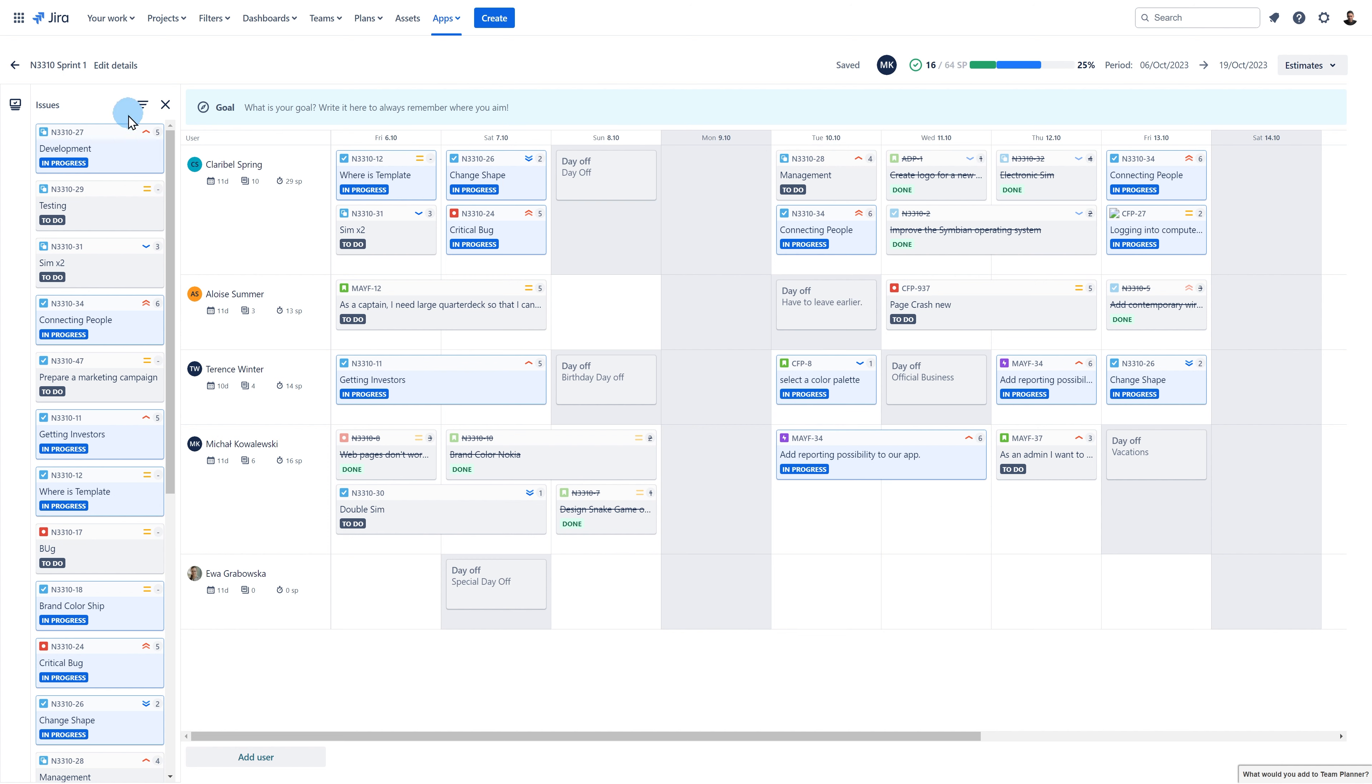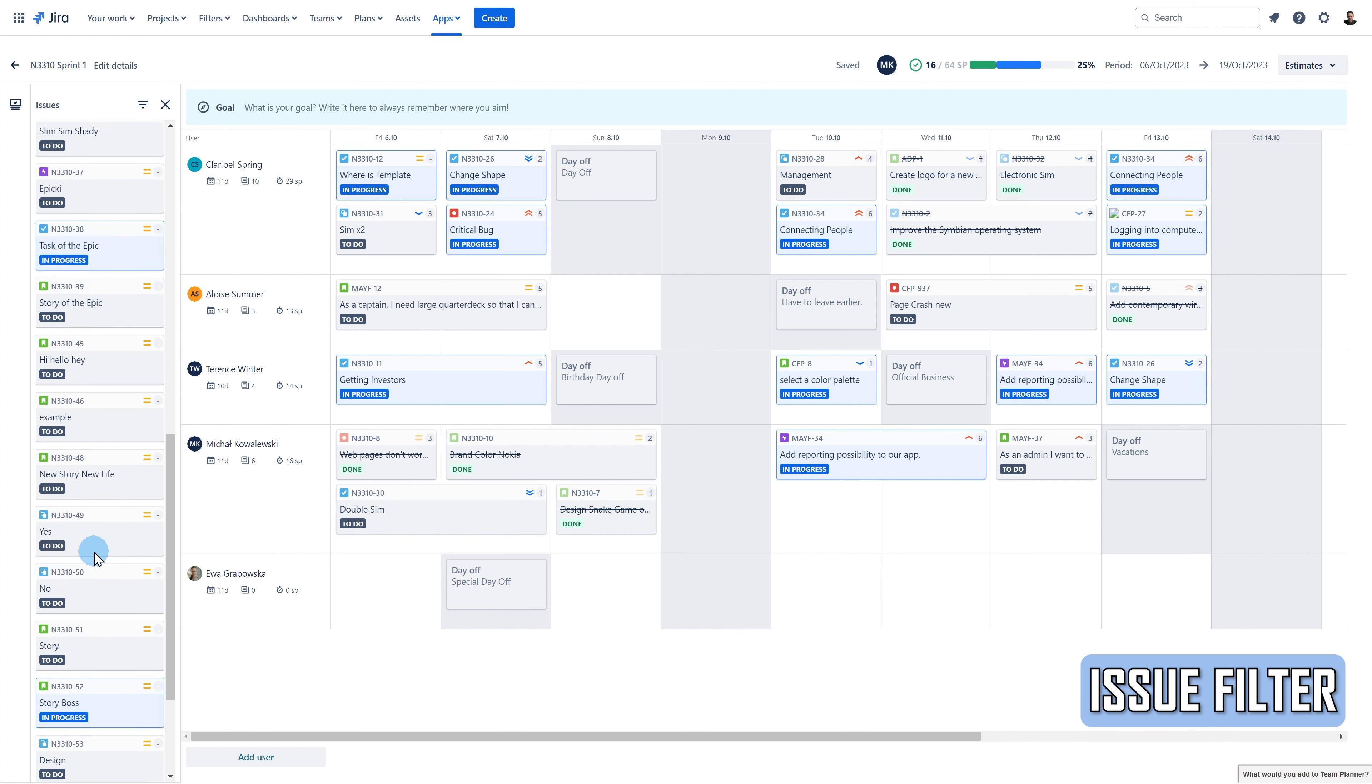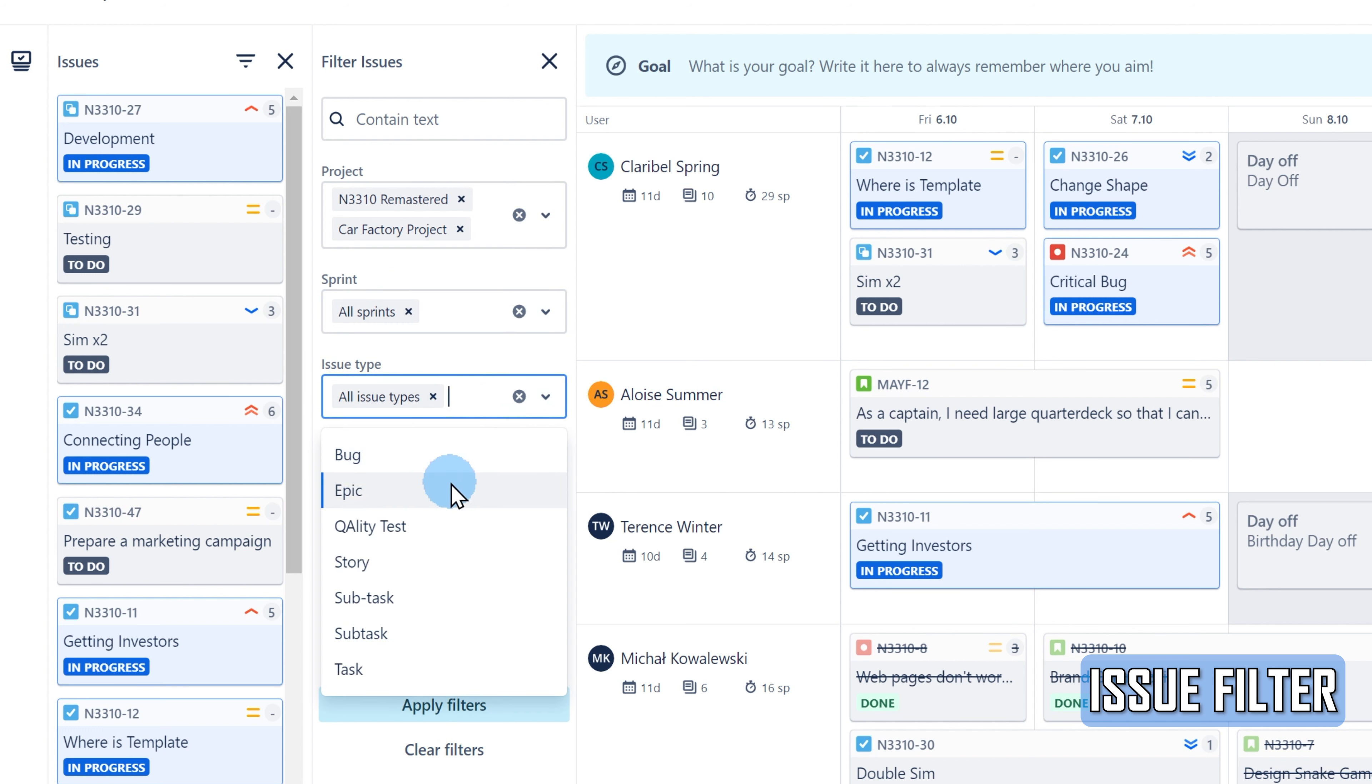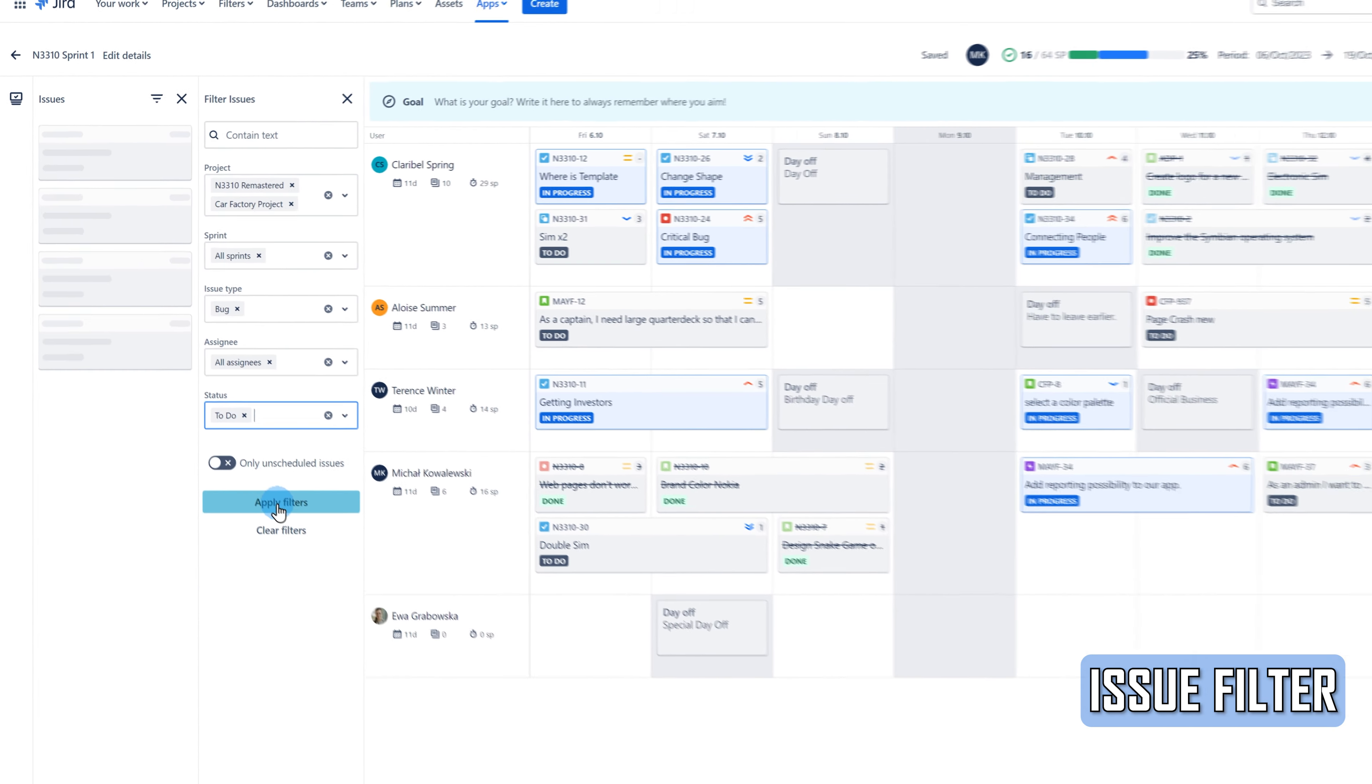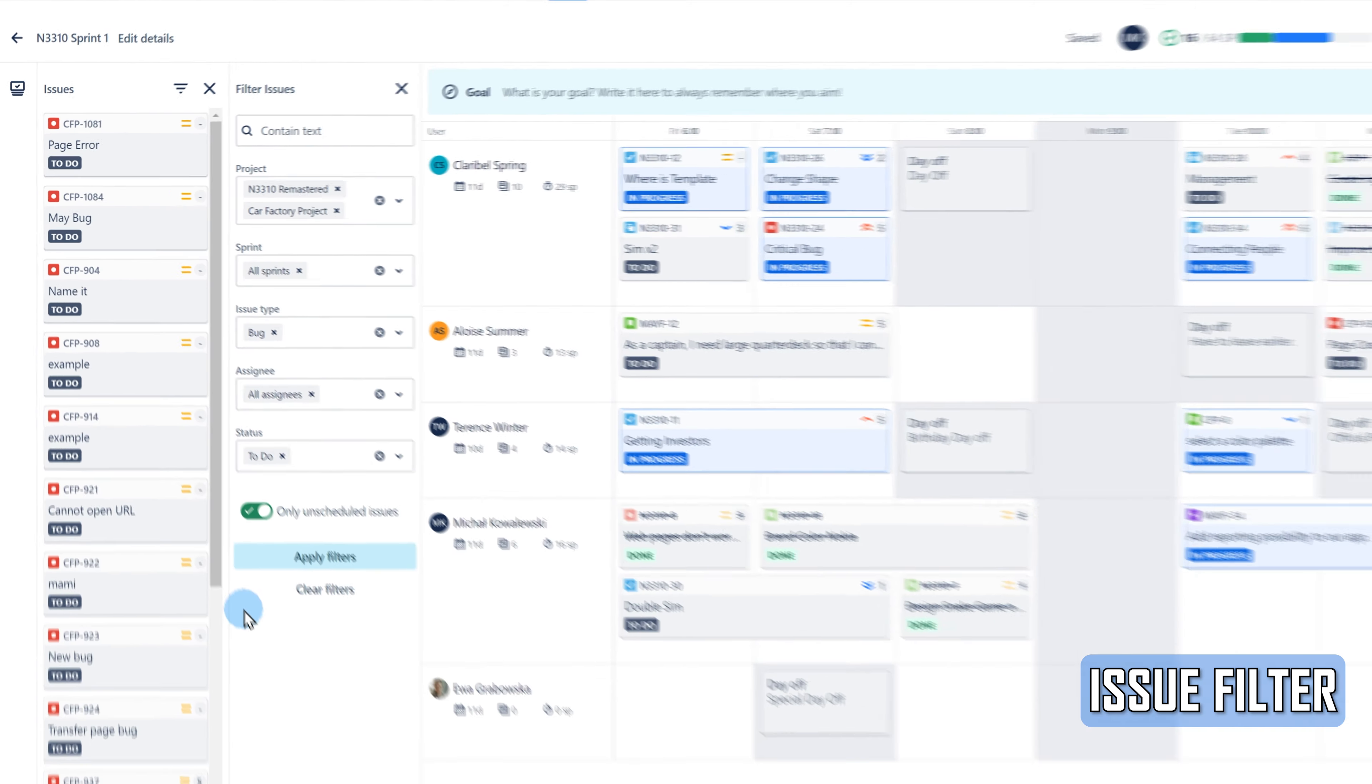Looking for specific tasks? Of course, you can scroll your tasks and load more from the left-hand sidebar. But maybe you would like to narrow down your search. Open a filtering panel and choose your filters. You can filter your tasks by the Summary, Project, Sprint, Issue Type, Assignee, and Status. If you use the Sprint filter, the app only shows you JIRA tasks related to the particular Sprint. You can also filter Plan Backlog by unscheduled issues. The filter will show you, then, the tasks that haven't been added to the plan yet.